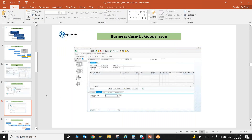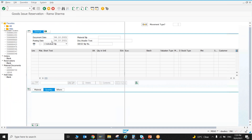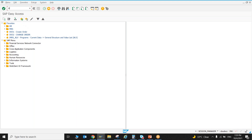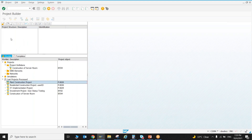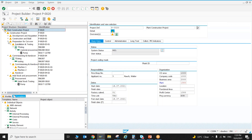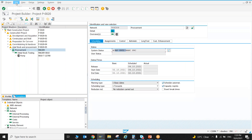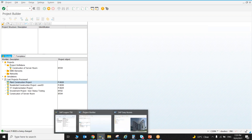I found the issue. When issuing this material, the WBS element is in released status but the network is not yet released. The network needs to be released first. Go to Status, then Release. Now the system will allow issuing the material. Come back to transaction MIGO, enter the reservation number and press Enter — now all the details come through: pump, reservation number, total requested quantity of 5.